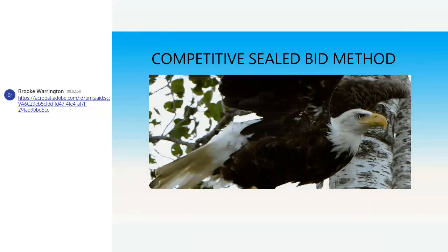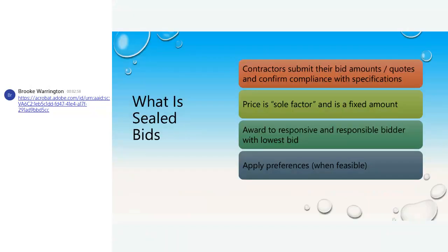Now, your competitive sealed bid method is a different one. What is a sealed bid? Contractors submit their bid amounts, their quotes. They confirm compliance with all the specifications. Price is the sole factor, and it's a fixed amount. You always have to deem them responsive and responsible, and then award to the lowest bid. You apply any preferences that you have in place if it's feasible.